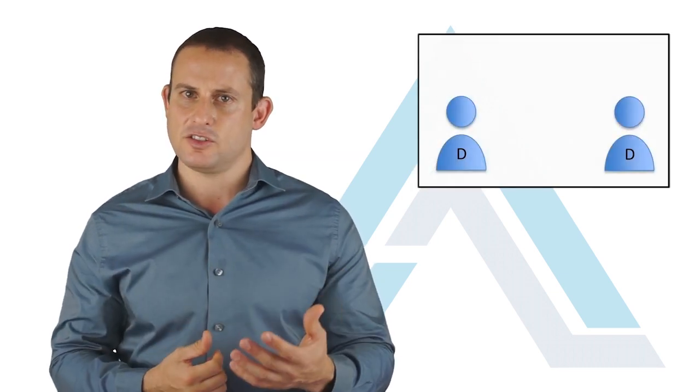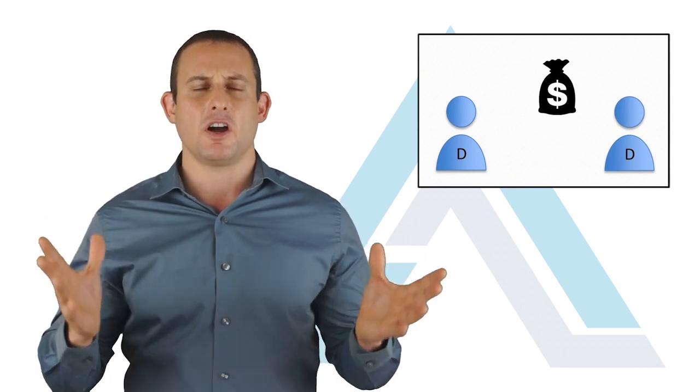Incentive schemes focused on the individual. Many organizations maintain performance reviews and associated incentive schemes that are based entirely on individual performance. Hopefully by now you've absorbed the fact that there is no I in Scrum team. If reviews don't incorporate a significant focus on team collaboration, then the organization will be sending a contradictory message to the team members. Now, I've just run through a small selection of impediments that your team may face, and no doubt you have and will encounter many others on your journey.